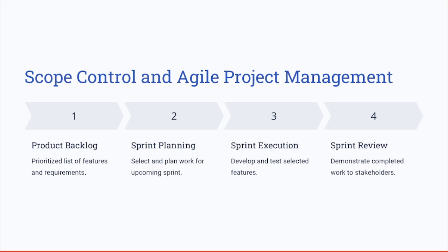Think of this if it was a traditional or waterfall project. Instead of requiring a formal change request, the feature in Agile is planned into an upcoming sprint if the requirement has achieved a higher prioritization.